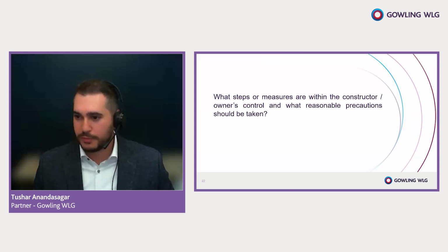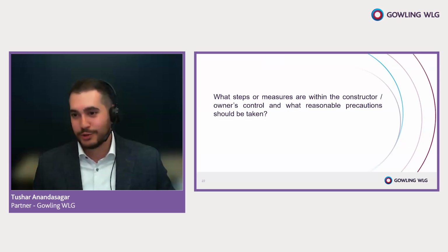As part of this procurement process, I think the expectation is that if you don't have defined health and safety expertise, you will pull somebody in who has it, because if somebody gets hurt and then 5 or 10 years down the line your due diligence is being put under a microscope, you want to be able to hold that person's credentials up and say, look, we had this reviewed by XYZ consultant who is a certified XYZ. And that is why, court, you should accept this as part of the due diligence defense.